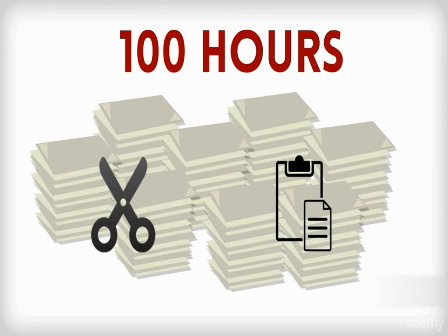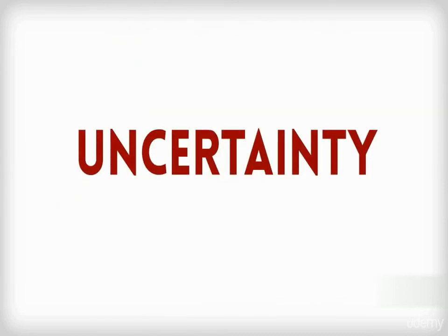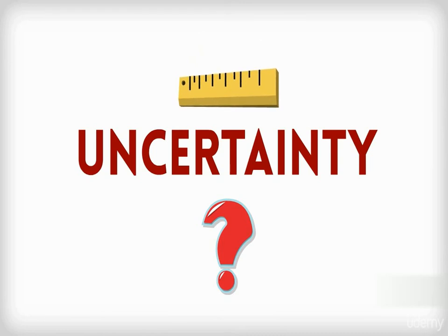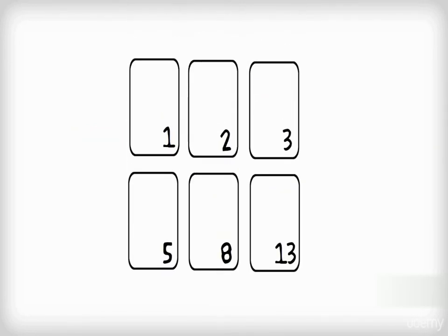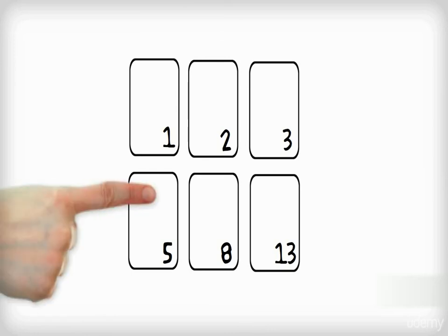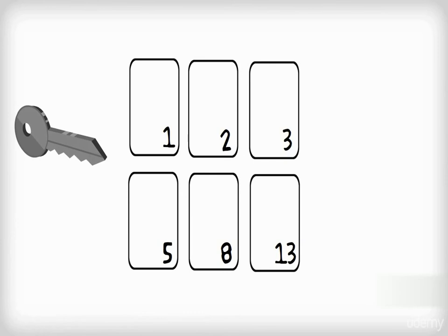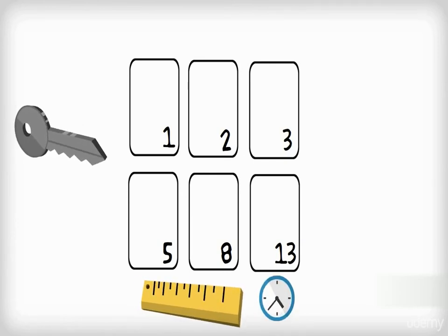What a joy! Uncertainty also inflates the estimate since it represents an unknown quantity of effort. All of these different forms of effort are represented by the story point unit, which is what makes it so powerful. In the end, the key thing is that story points are proportional to the time a story takes to complete relative to other stories in a backlog.